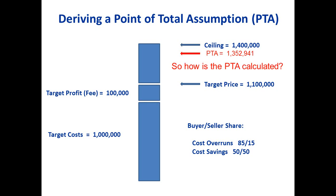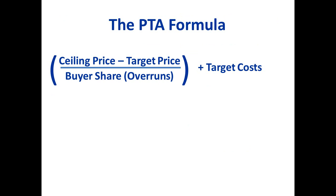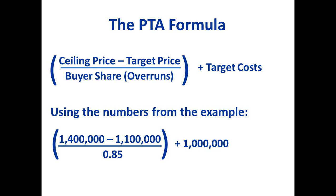It's a fairly simple formula to calculate PTA — point of total assumption. It's the ceiling price minus the target price, divided by the buyer's share for overruns, plus the target costs. So there's a subtraction, a division, and an addition. Plugging in the numbers from our example: one million four hundred thousand minus one million one hundred thousand equals three hundred thousand dollars. Divide that by 0.85, then add a million. It's important to remember to divide by 0.85, not multiply by it.